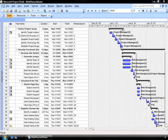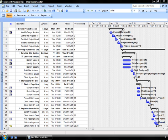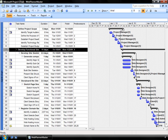You have dependencies that affect the timing of the tasks, and they are in relation to other tasks in the project. You can't begin to develop the functional site specifications before you define the project scope. So that's why you see a line linking this phase of the project to phase number two. Anytime you see lines within your Gantt chart, you are identifying a dependency between phases or tasks themselves. The larger black lines identify a linkage or a dependency between the two different phases, whereas the smaller blue lines show a dependency between the different steps within that phase.